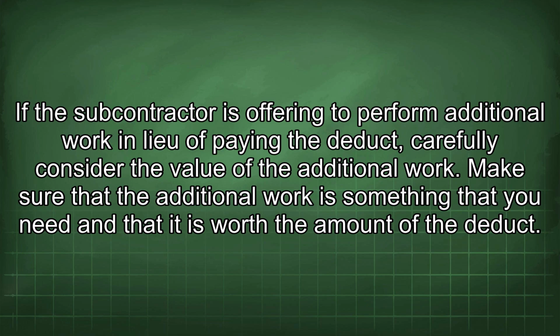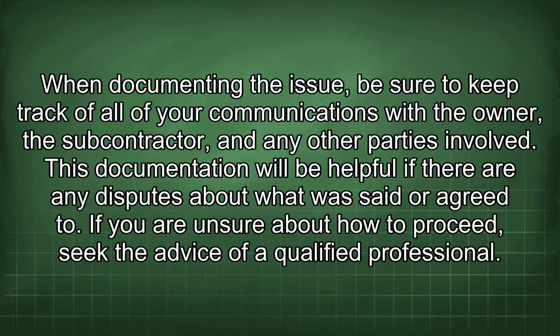If the subcontractor is offering to perform additional work in lieu of paying the deduct, carefully consider the value of the additional work. Make sure that the additional work is something that you need and that it is worth the amount of the deduct. When documenting the issue, be sure to keep track of all of your communications with the owner, the subcontractor, and any other parties involved. This documentation will be helpful if there are any disputes about what was said or agreed to.